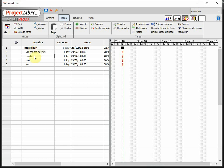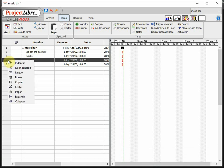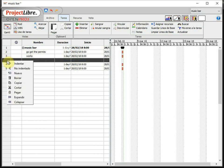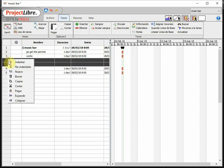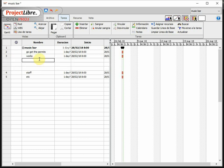But what about works? Works is a complicated thing and I need more level of detail. So this is why I'm going to try to find more inner boxes inside of works. Another level in my WBS. So the first thing is that I need a space in between works and staff. So I go here on the left margin. I right click and I get a new one. And so I hit the new space. And so I do it again. And I do it as many times as I need, depending on how many tasks or sub boxes I need to add in here.